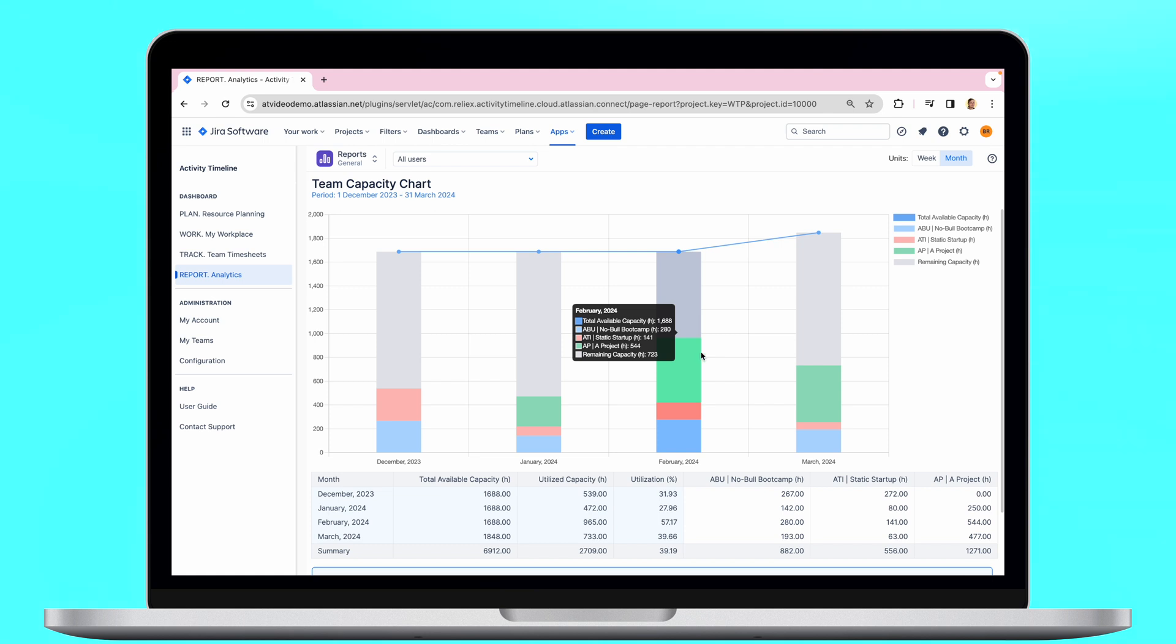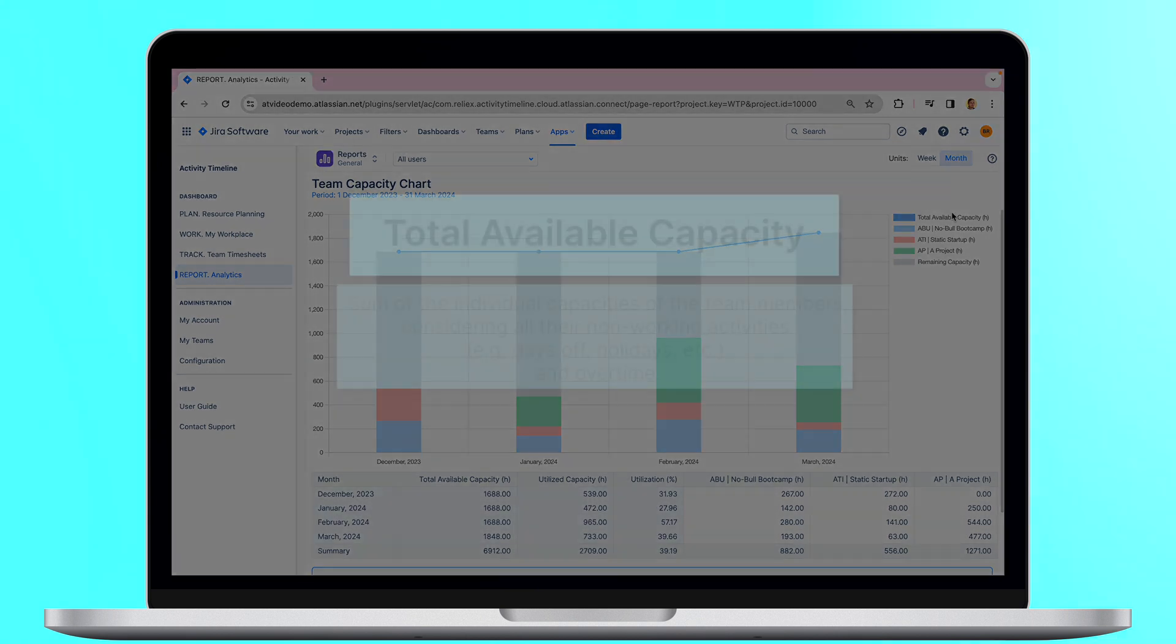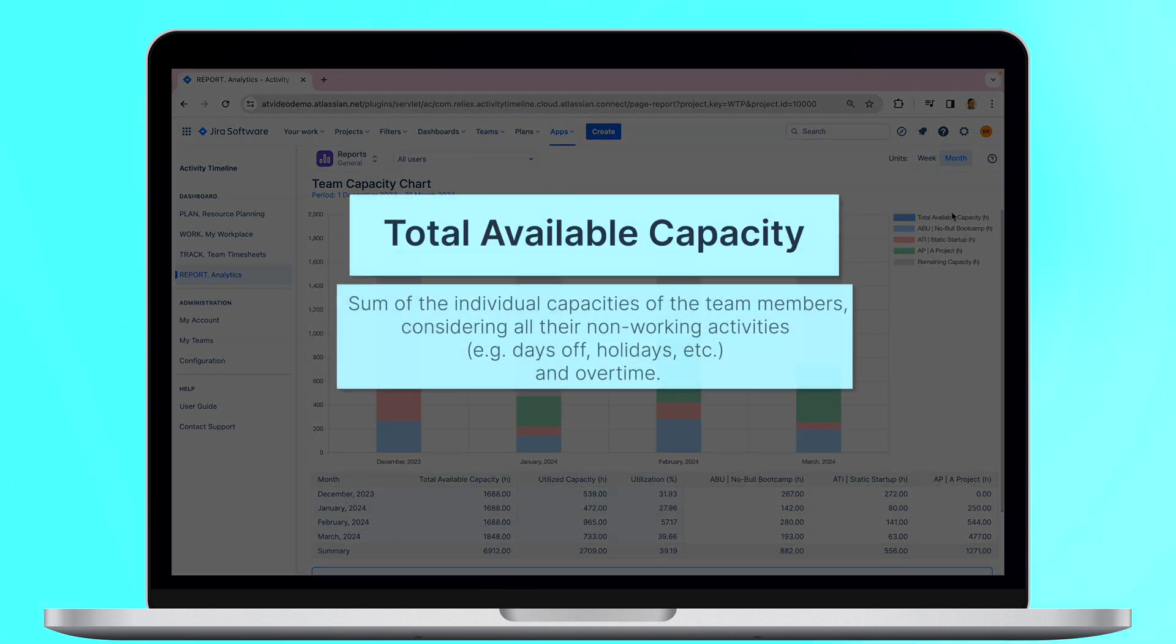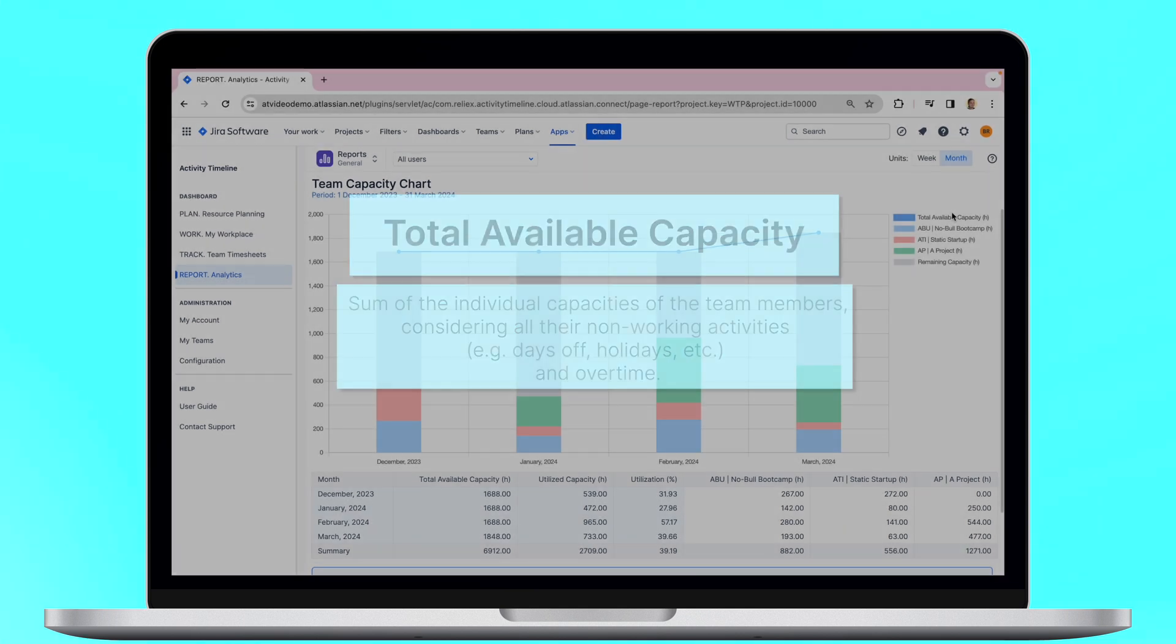Here are the key components of the Team Capacity Chart. First goes Total Available Capacity. This is a sum of the individual capacities of the team members considering all of their non-working activities, for example, days off, holidays, etc., and overtime.